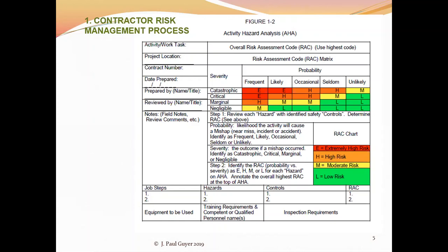Now, in looking at a particular construction project, you actually start out, one way of looking at it, by identifying defined features of work. This is just some of the wording that is used. So let's take a simple project. You're building a house, and a defined feature of work is the site grading, as an example.